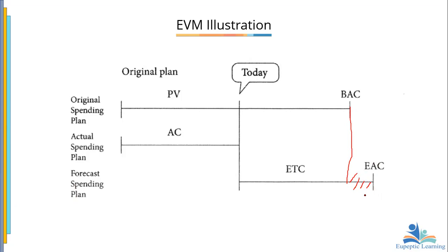So this is the estimated cost to complete. If this whole thing was 60,000, by now we should have spent 30,000 here, and then we'll need 30,000 to finish. But looking at where we are now, if let's say we have spent 40,000, you will spend more, is that not it, to complete this project. The remaining 20,000 will take us to this part, but we have not finished. Have you seen? So what it means is that there will be a certain variance. So this is how it can be illustrated.